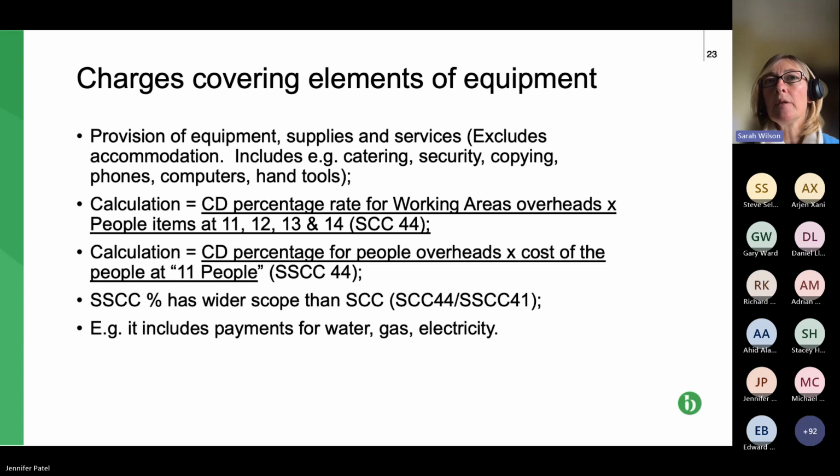So it includes those consumables, the water, the electricity, for example. It includes the items at bullet point 1. The percentage, as we've discussed, needs to be inserted in contract data part 2. And to my mind, because it includes more items, logically, I would imagine it would be a bigger percentage for the shorter schedule than for the schedule, because the schedule covers a smaller number of items.